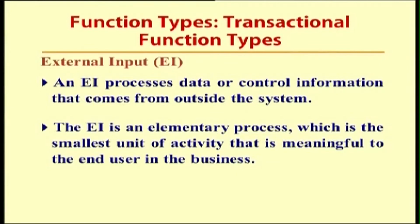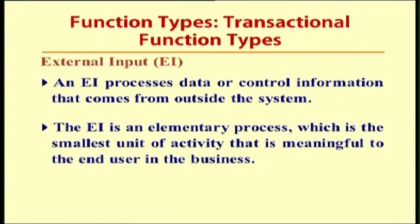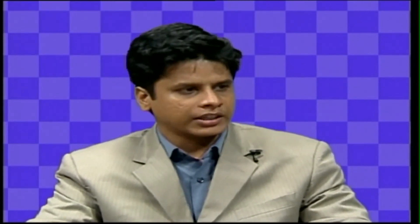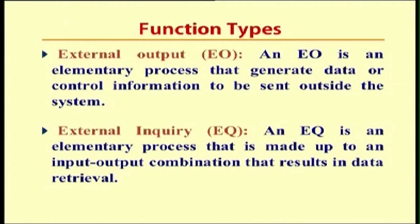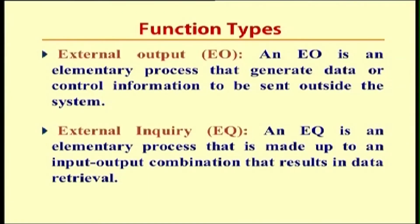The second function type is the transaction function type, which has three values: external input, external output, and inquiries. External input (EI) processes data or control information coming from outside the system — it is an elementary process, the smallest unit of activity meaningful to the end user. External output (EO) is an elementary process that generates data or control information sent out of the system. External inquiry (EQ) is an elementary process made up of an input-output combination that results in data retrieval from the database.